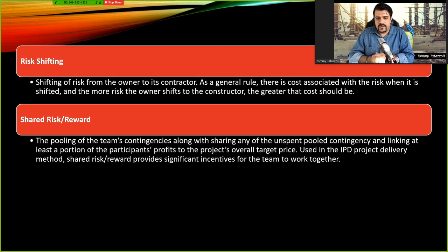Okay, so shared risk or reward is where all the team, like I just said in IPD, work together to mitigate the risk, for example, to meet the target price. Target price promotes or encourages sharing the risk. If you remember, target price is the only reimbursement method in which the designers are also involved in the risks of the project. It means once they are done with the design, they're not out.